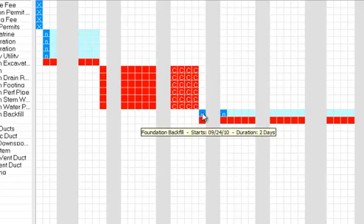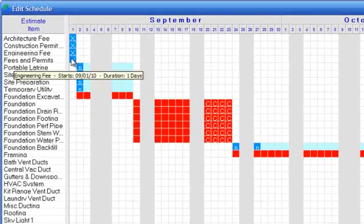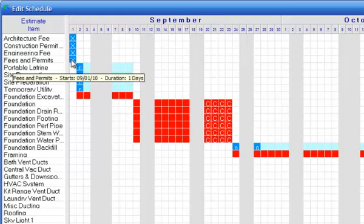N means no resource. That means that no resource has been scheduled for that item. X means the item has been completed.